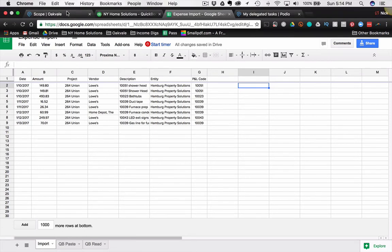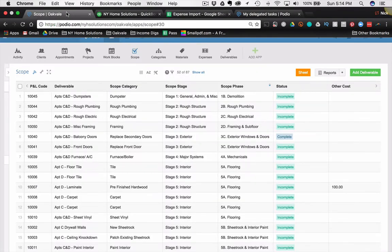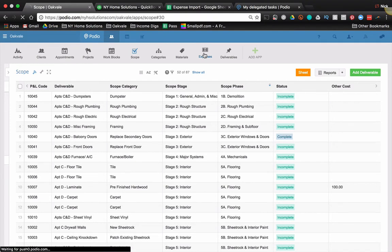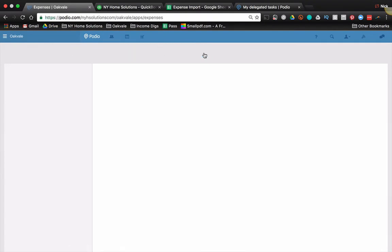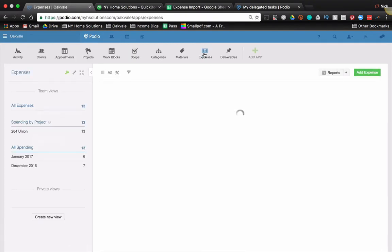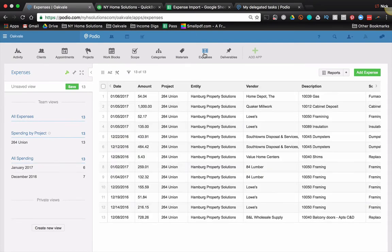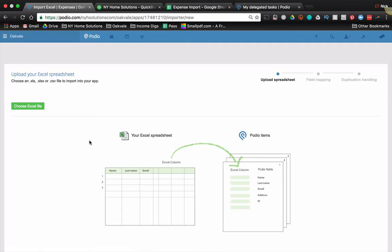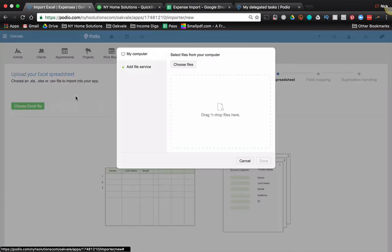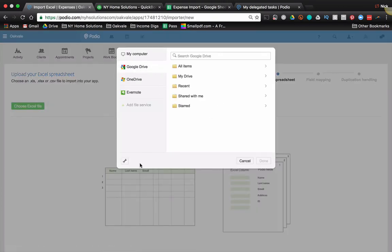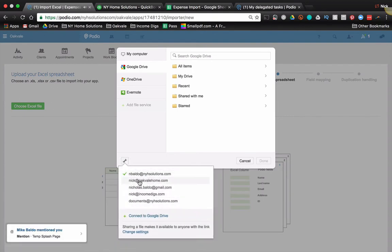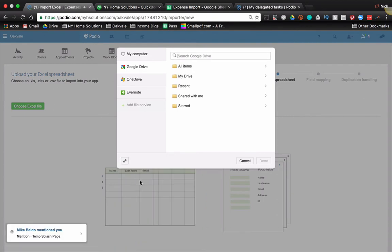So what I'm going to do is I'm going to go to my Podio. Now I have an expenses app where I'm never going to add an expense manually. QuickBooks is the source of truth for all my expenses. However, on a weekly basis, it makes sense for me to update this. So instead of adding an expense, I'm just going to do an Excel import, choose your Excel file.